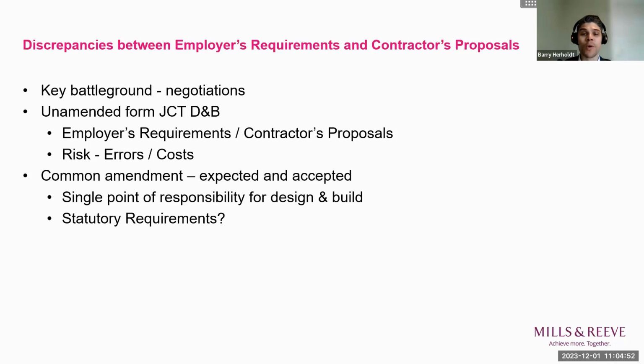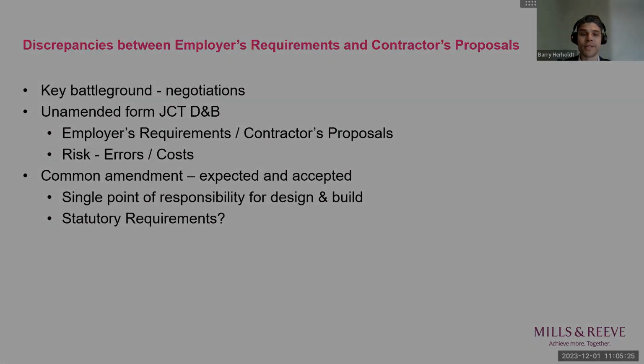For those who might not know what the base date is, it will generally be defined in the contract, but simply explained, it's the date at which the contractor is expected to have been aware of the law and similar requirements when it bid for the project. With that in mind, my top tip is this type of clause must be considered with great care, and each party should understand and be clear on its responsibilities. Where an employer creates a single point of design responsibility, contractors should be familiar with the risk that they are signing on to, for example, the expected design standard or the required skill and care duties.